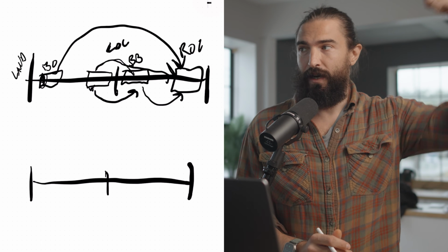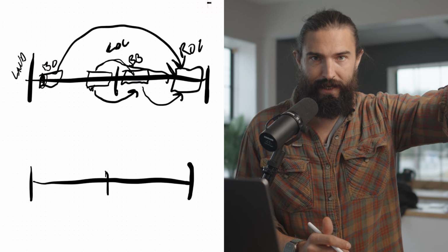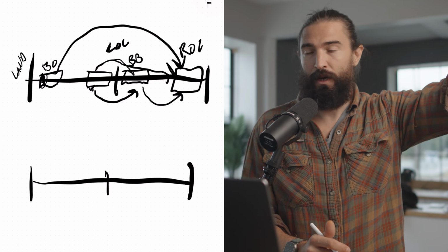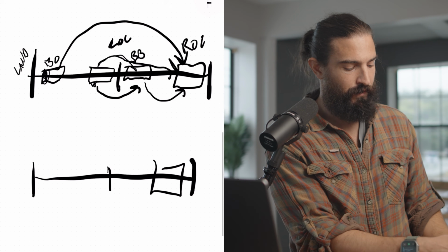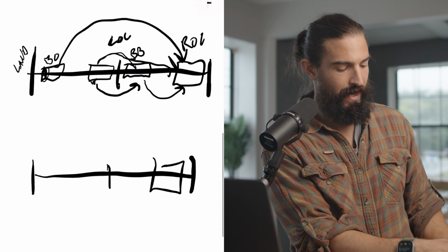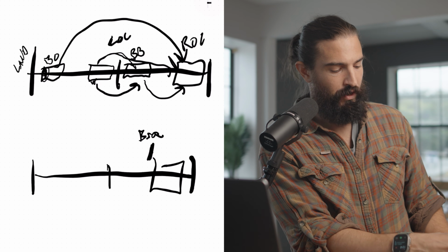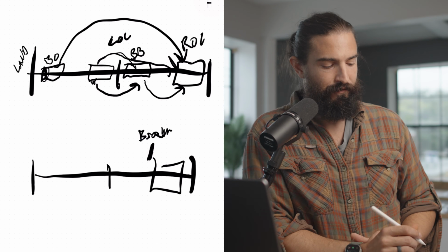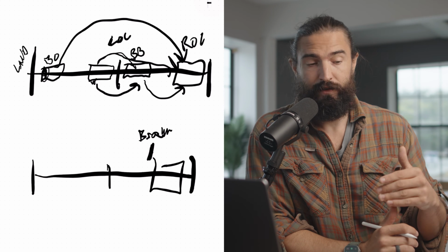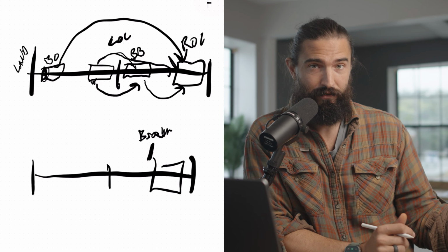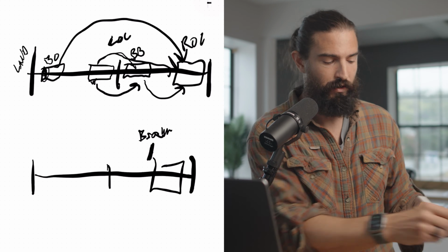Okay, so bodily harm, bleeding, that means that water usually is getting in the house and it's messing stuff up. Baseline means that here on this range of comps, I could be right here at the bottom, the baseline. That means that if some of the houses in the neighborhood, as I'm doing construction comps, have LVP and other ones have hardwoods, easy choice. I'm doing the LVP because I do the baseline.